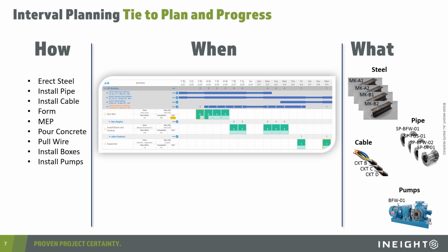And so that when we're creating these interval steps, they're really based on that information that we already have, the component information, the takeoff information, how many pipe spools do we have to install, how many welds do we have to perform, and so in addition to